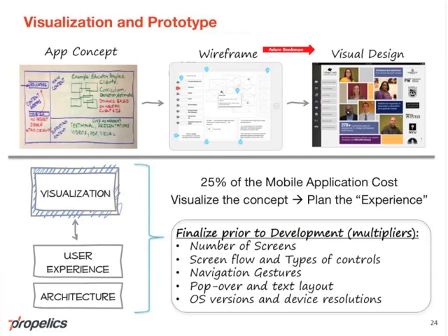That's what this is called when you get it into Photoshop and actually lay it out and take a look at what the screens are going to look like. This you would want to make clickable, be able to distribute that and demonstrate this for your user buy-in. So if it's an 8-screen application, the first quarter, we'll spend a couple of weeks laying out the screens, doing the visual design, creating the clickable. With this, we'll basically finalize the scope before we get into development. We want our acceptance out of this.